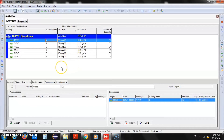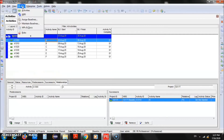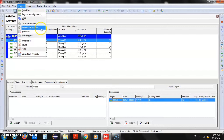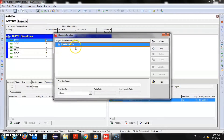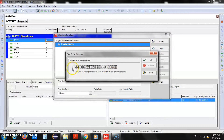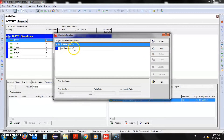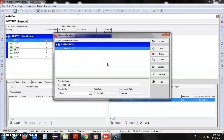Let's say the start date is the 3rd of August. We'll select the 3rd of August and click Schedule. Now all the dates are accurate as per our settings. Let's say this is the version of the plan we have all agreed on and now we want to make this a baseline. We'll go to the Project menu where you will see two options: Assign Baseline and Maintain Baseline. We'll go to Maintain Baseline to create a new one.